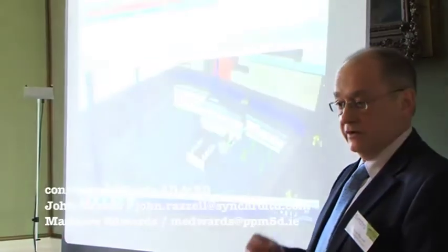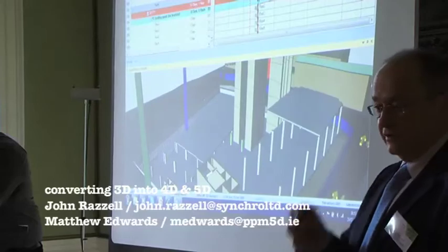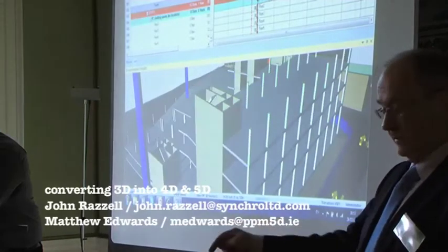Pathfinder allows us to say, well, I want this item to go from that point to that point along a certain route. And it will path along that, and if there's anything in the way along that route, it will actually flag it up as a clash detection and say, at this time, at this date, you're going to have a clash there when that item goes through. So this could be a train going through on works, so they can plan it so the train goes through at a certain time, and if they're doing other works within the track, they have to make sure it's out of the way, and the clash detection will pick that up. So you don't have to move it step, step, step from that point to that point, and it will run.